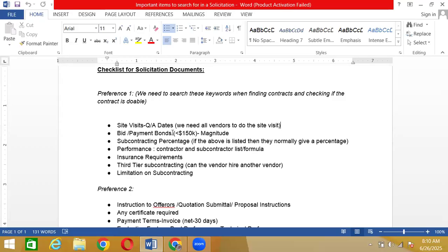And we should have $80,000 at the start of the work, and it should be maintained by the end of the work. So in that duration, if the vendor does anything wrong, like what if they ruin something, the government could go ahead and deduct from it. They would have the surety that we have to complete the work, or they would cut that money. That is what a bond is.